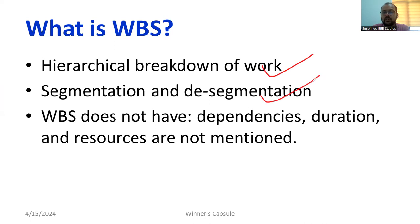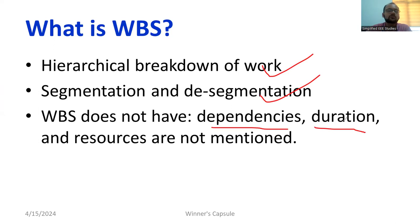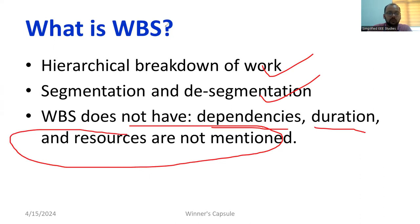Segmentation and desegmentation is the major key tool of WBS. Unfortunately, dependencies are not considered — all tasks are treated as independent work with no correlation. If one segment is missing, the entire project will not be completed — that is a problem of WBS. Duration is also a challenge because we do not know when teams will complete the work. Additionally, resources are not mentioned in WBS. These are the major drawbacks of WBS.